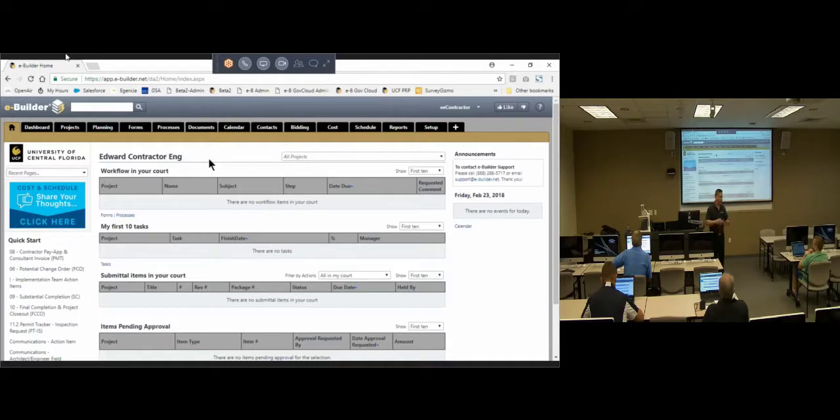You guys should be having a meeting about the current schedule itself. What we trained the project managers to do was, if you needed to assign a resource to a task, you take an option and that will send out a notification to you. So if that task is not for another 2 months or a month and a half, you'll still get that notification right away. As far as showing up in your court, that might be at a later time, but you will be notified as soon as they assign you as a resource on that task. So for anyone else that has issues with communications with their project manager, communicate that ahead of time to them.